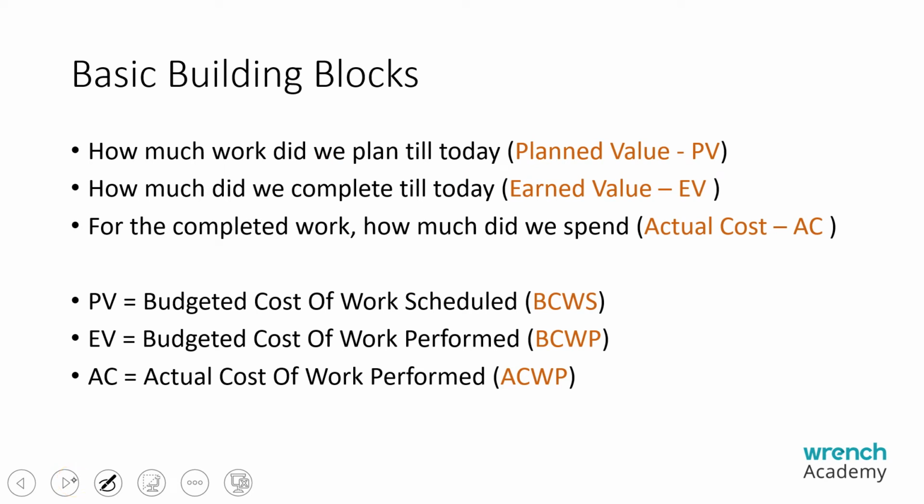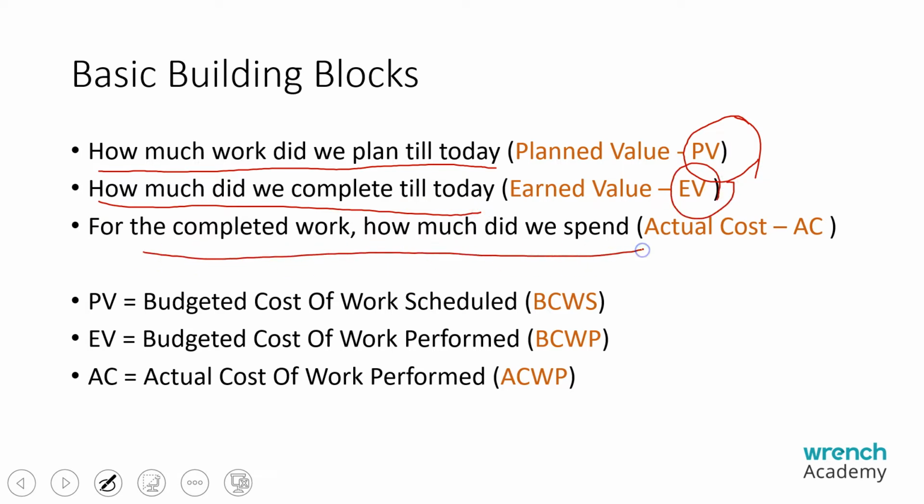Earned value project management revolves around three basic concepts. The first is how much work did we plan till today? That is, till today, how much work we were supposed to complete. We call it the planned value. Then out of the planned work, how much did we complete till today? That is the earned value. And for the completed work, how much did we spend? That is the actual cost.